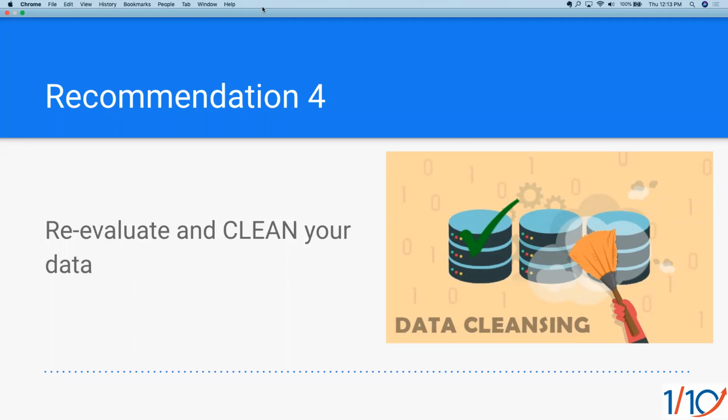And of course, cleaning your data, especially if you're consolidating from different systems or you have different spreadsheets. You're going to want to ultimately put it in a big spreadsheet and deduplicate and make sure things are standardized. Phone numbers, email addresses, addresses, zip codes, all those are going to be standardized. And if you can't do it, totally understandable. This is where you might want to enlist a consultant where you can hand them your file, give them very specific rules of what you want them to do, and they hand you back a file that's clean.